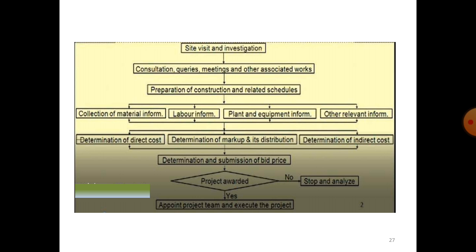At last, the bid price document is prepared, and if the project is awarded to the contractor, accept the project terms and execute the project, and if the project is not awarded, then stop the analysis work. So these are the steps of the bidding process.